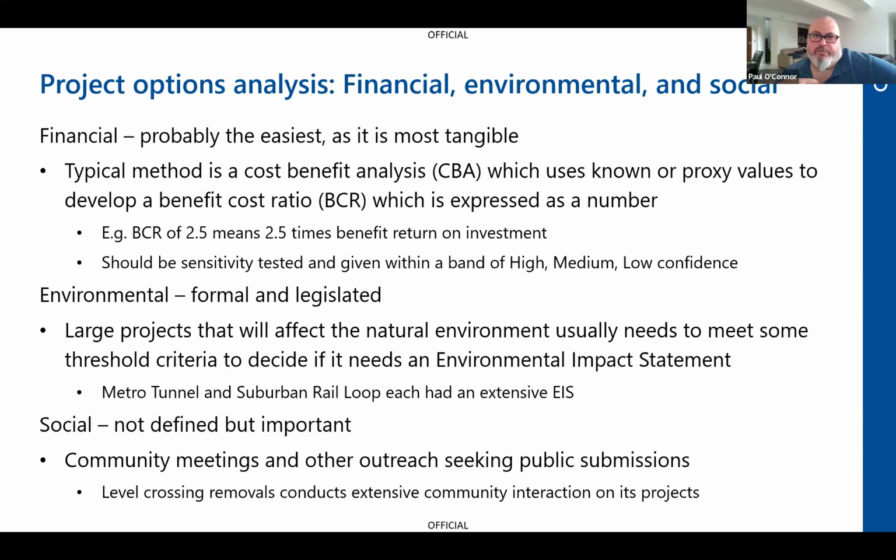And the last one, which is sort of interesting, is you can actually do scenario-based testing. They could be more politico-economical. Like you might have a scenario that says economic downturn plus population growth, or population loss plus economic downturn. So you can start looking at those higher-level demographic super trends, which is often called scenario testing rather than sensitivity testing.